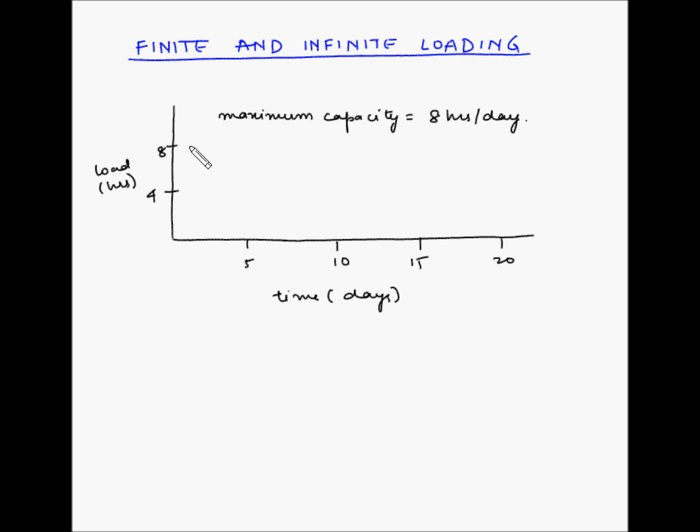So in case of finite loading, you will load this resource with eight or less than eight hours per day. The loading will appear something like this: eight hours for a few days, might be less for a few days, and again eight hours and less than eight hours, and so on.